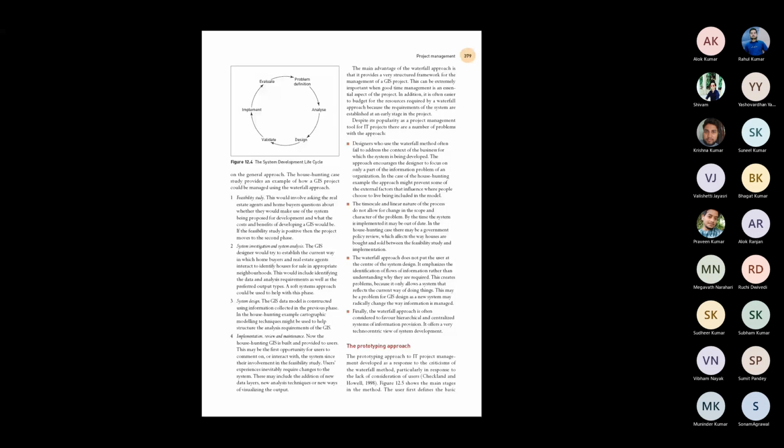When the problem is well structured and the solution is well known, in such projects the waterfall model is preferred. Why? Because requirement specification is done only at the starting phase, not in the intermediate phases. The user is also not involved in the intermediate phases, only at the start and the final implementation. So this one is used only when the problem is well structured.